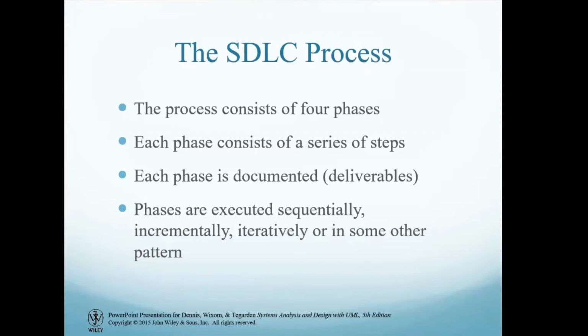So every phase has a deliverable, and these phases are executed sequentially. It means you must go through planning first, then you can come to analysis. You cannot do analysis first and then go to planning. No, it's sequential, clockwise: planning, analysis, design, and then development. You must go in this direction, and this is why it is a sequential process.